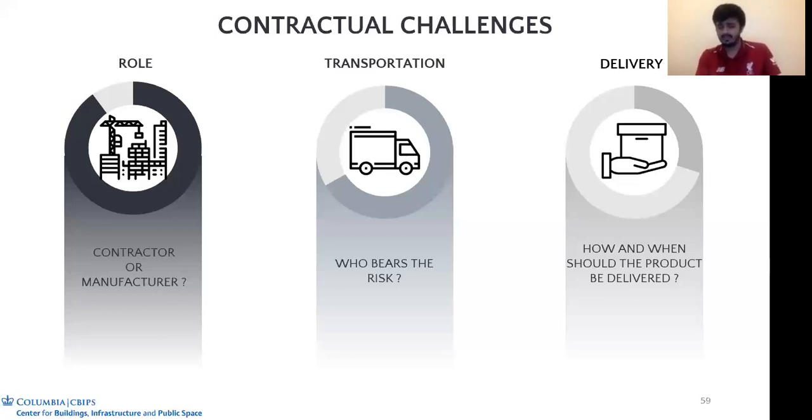Also, there are different trade licensing agreements when it comes to modular construction. These trade licensing agreements and labor agreements can also be the source of dispute on a modular construction project. In particular, certain construction trades or labor groups with a rightful claim to certain scopes of work at one location may not be applied or recognized at the opposite site of manufacturer or installation. So it all comes down to the drafting of contracts and clearing this ambiguity.